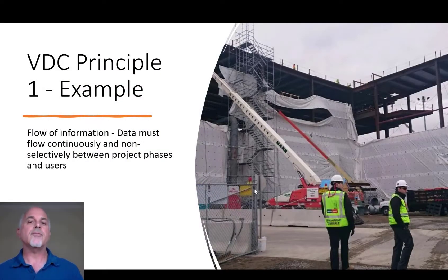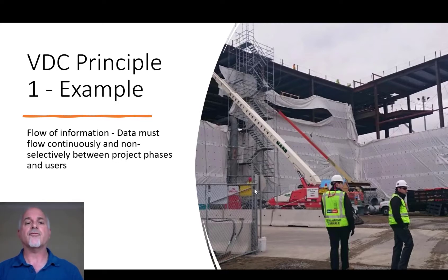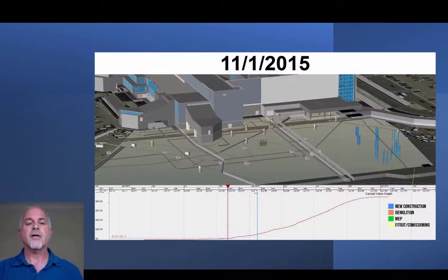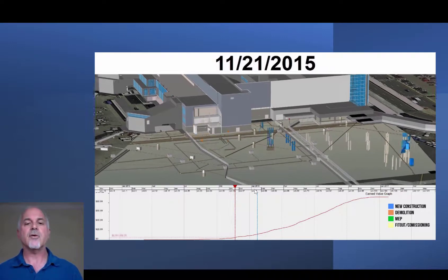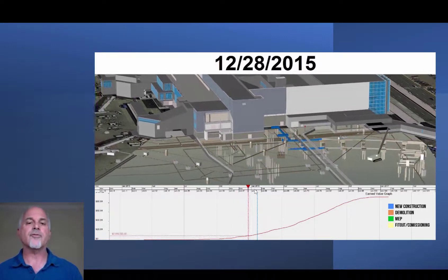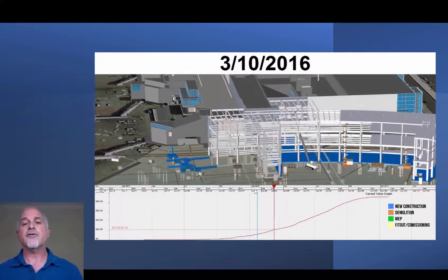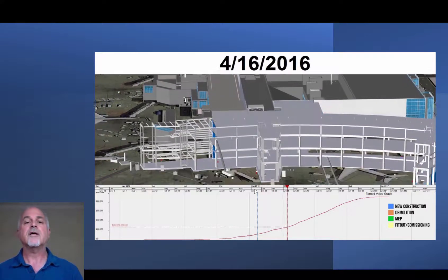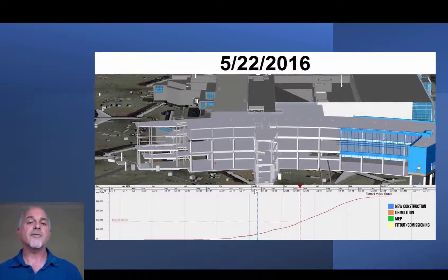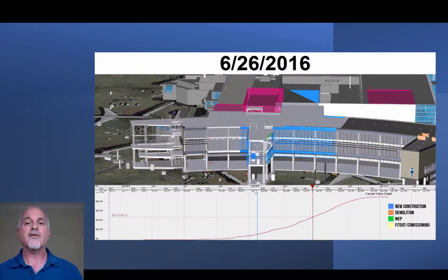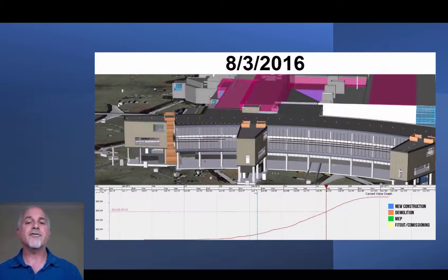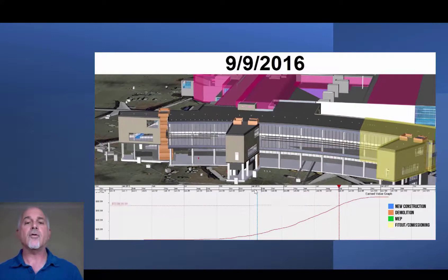I'd like to show one example from actual projects for each of the principles. The first one, as I mentioned, is flow of information. This example comes from an airport project and shows how, during the course of the project, the 3D information or the BIM model is integrated with schedule data and cost data that are continuously updated through the course of the project, as well as the increasing detail of the design model.